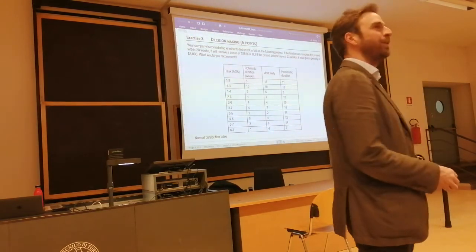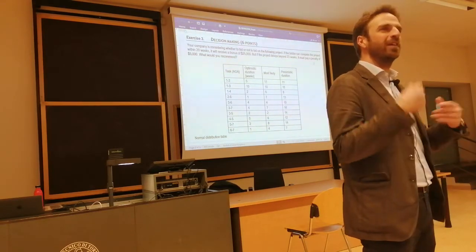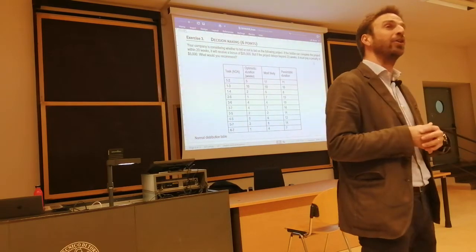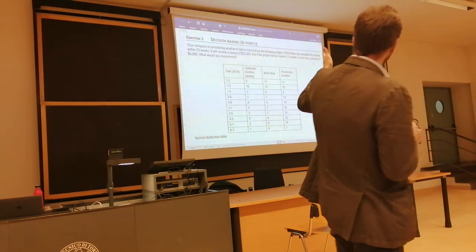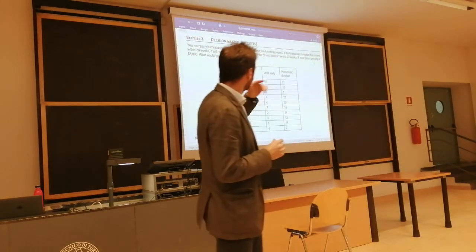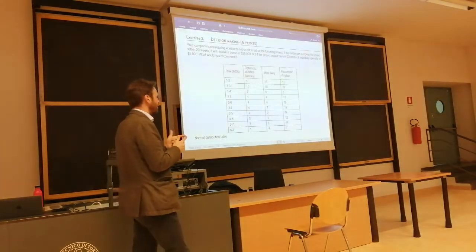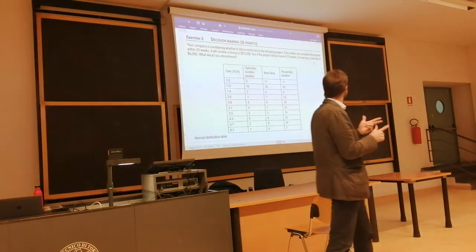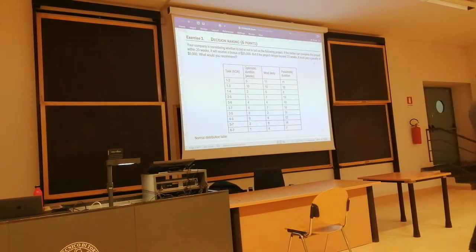So if you didn't fly away from Torino in December and you were here, now you're experienced with doing probabilistic scheduling and PERT. What you got here is, for all tasks, the optimistic duration, the most likely duration, and the pessimistic duration, given with a 99% estimate, a 6 sigma estimate.